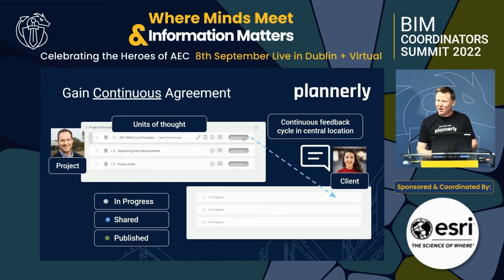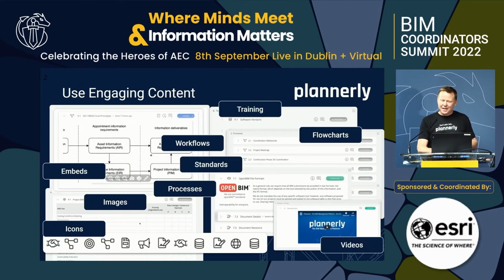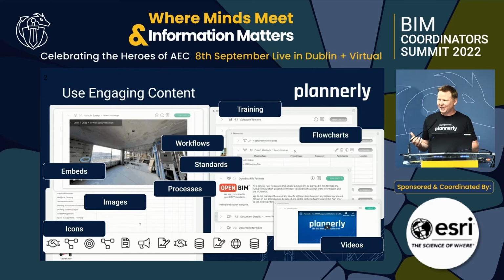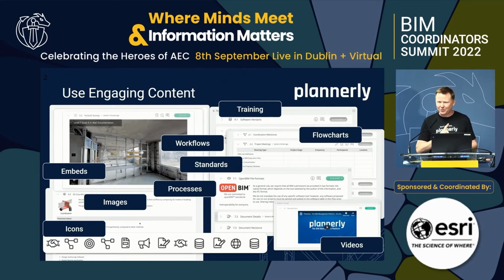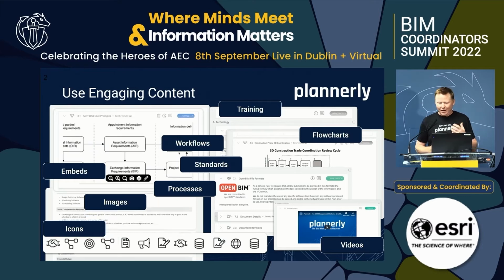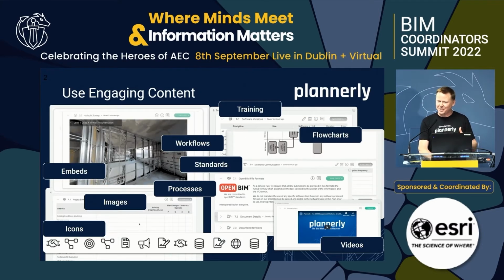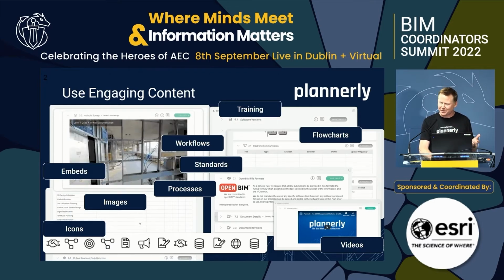We should also try and have continuous agreements. So rather than waiting until that BIM execution plan is finished and releasing it, if we could release it on a piecemeal basis, and the client could have access only to the pieces of information that really are needed at that point in time, it would expedite that approval process. If we could also use engaging content rather than boring long documents, how about including embedded information and processes that are actual workflow diagrams, icons, videos, things that are actually going to engage people? This is really how we can start to get agreement rather than create a document that nobody reads.